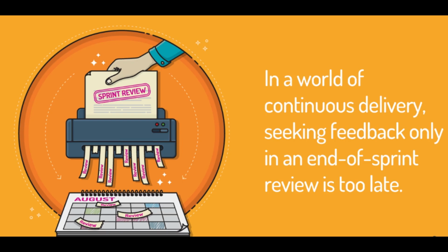Now, let me discuss a little scenario without transparency and with transparency. Suppose developer A is stuck on a technical problem for 3 days but does not mention it. The sprint ends and the critical feature is not done. The product owner is surprised and frustrated. The team misses their commitment.